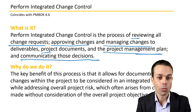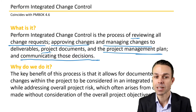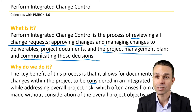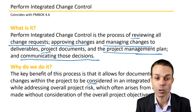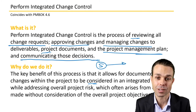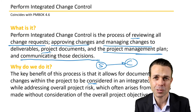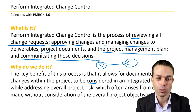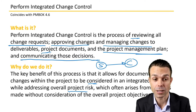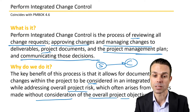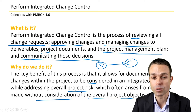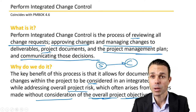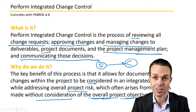Why do we do this? The key benefit is that it allows for documented changes within the project to be considered in an integrated manner. In other words, we're not just making the decision ourselves to make a change to the project scope and then saying to the customer, here's what we've delivered, only to have them say that wasn't what they wanted. So we need to go through the proper change control processes, addressing project risk — risk will arise from changes made without consideration to the overall project objectives or plans, people involved, costs, or the impact to things like schedule.